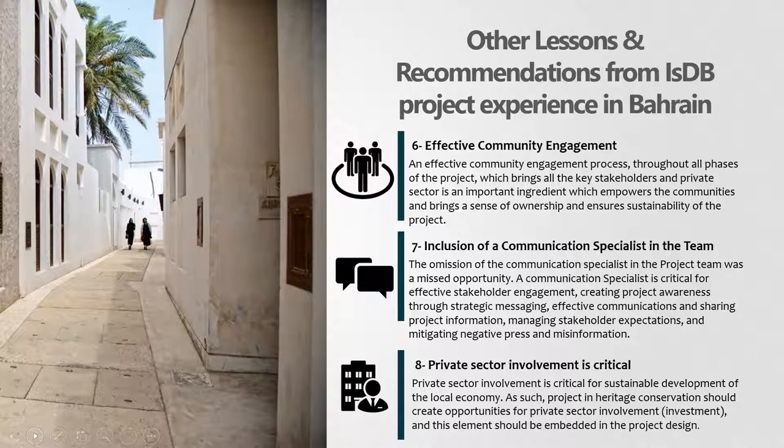We found also that inclusion of a communication specialist in the team is essential, because the omission of the communication specialist in the project team was a missed opportunity. It is critical to have this specialist for effective stakeholder engagement, creating project awareness through strategic messaging, effective communication and sharing project information, managing stakeholder expectations, and also mitigating sometimes negative press and misinformation.